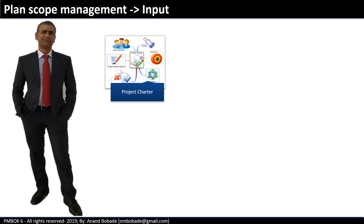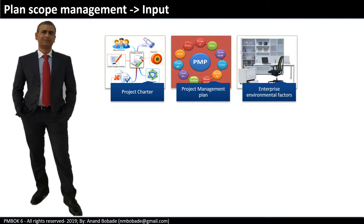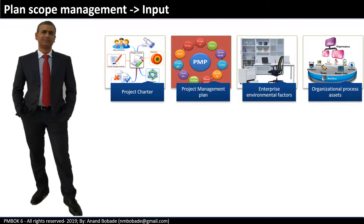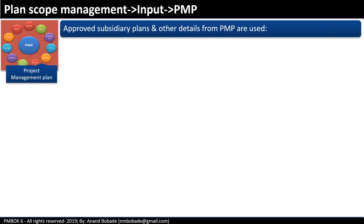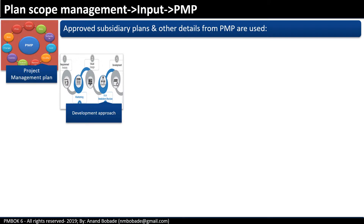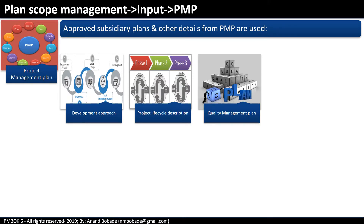Inputs are: project charter, project management plan, enterprise environmental factors, and OPA. The components of the project management plan that are relevant include the development approach — which might be predictive, incremental, or agile — the project lifecycle description, and the quality management plan.